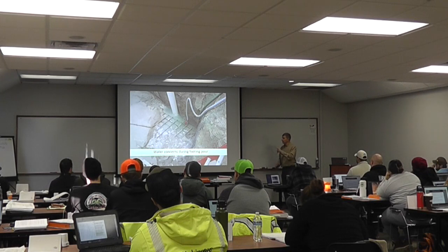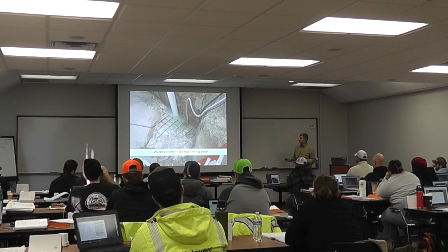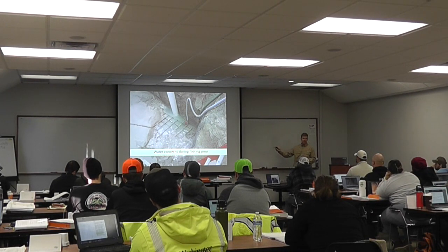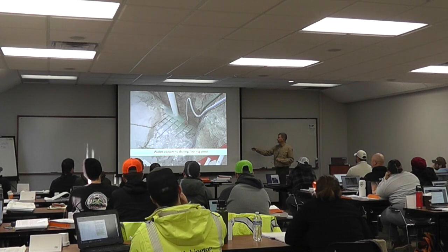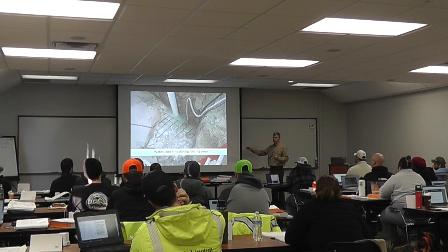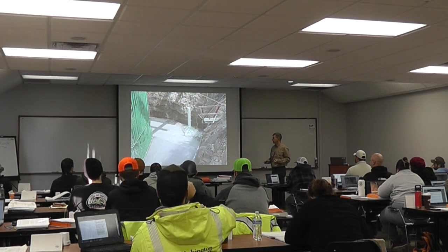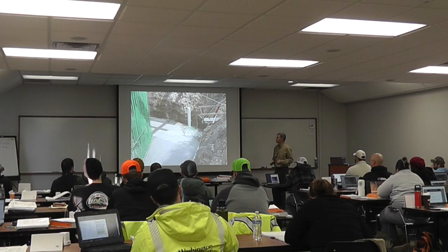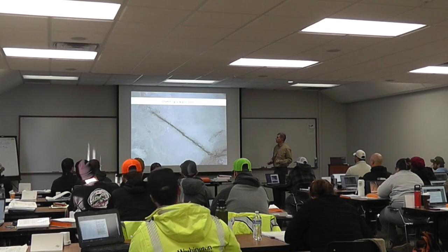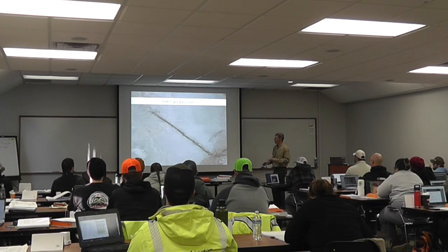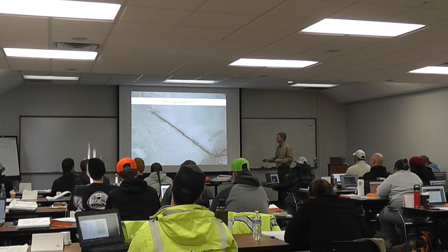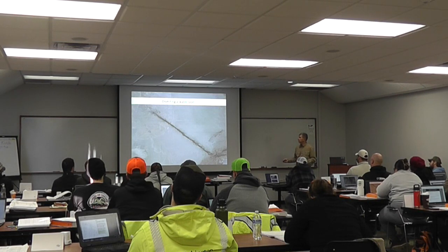So then when they go to the side, you'd have to pump it out. Obviously here we're getting some concrete, so this isn't stuff we would put back into the river, because that's going to be concrete contaminated, so you have to be aware of how they're pumping it out. Here's just a picture of how you might divert the water boil and keep that water out. Don't mix it in.